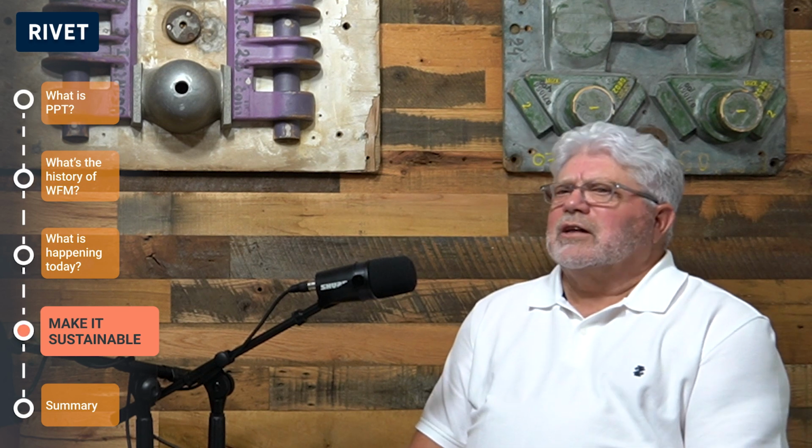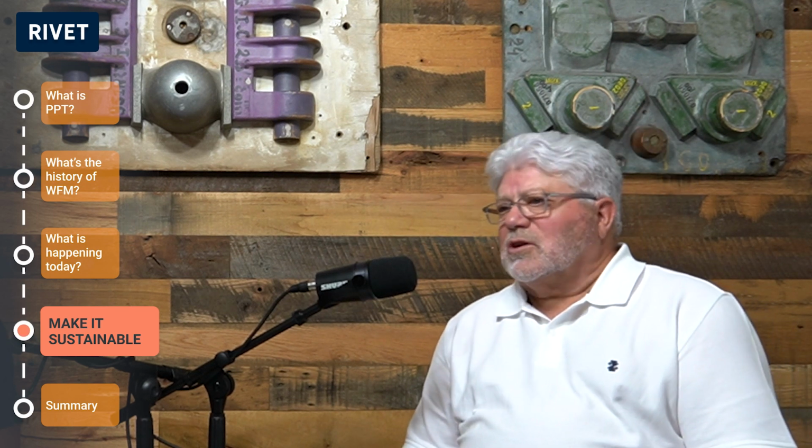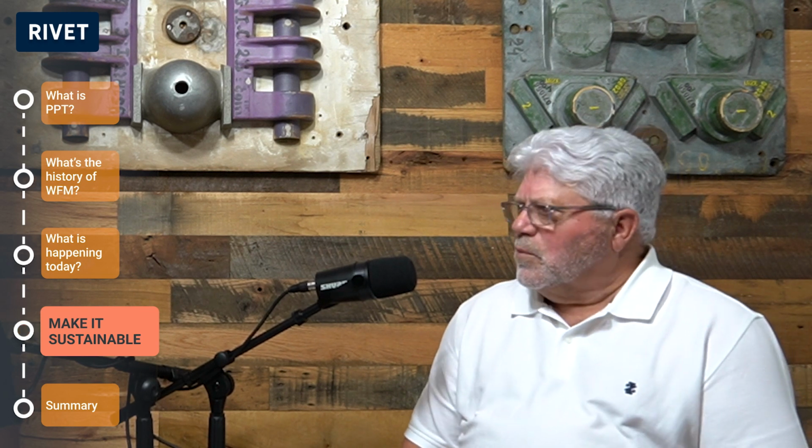So when I ask a contractor, do you do 2 week look aheads? I'll get an answer like, we do on some jobs, we do on others. Some project managers do, some don't. That tells me right away that there's not a sustainable training program going on. Therefore, there's no consistency, there's no stability in your processes, and you're lucky if you can bring a job in under the labor budget at that point.